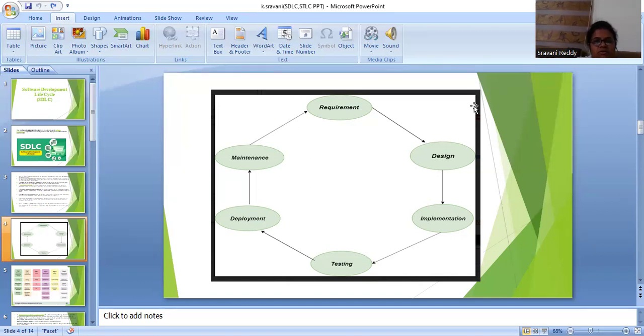First we'll gather all the information regarding the project, and a description of what they want the software to be, or the end user, and the purpose of that project. And once they have gathered and understood the information, they should produce the SRS document. The software development team should read the document and ask any questions. They will then pass on the document to the client. This way, the client can verify that the project is well understood by the team and can hold on to the document for future purposes.